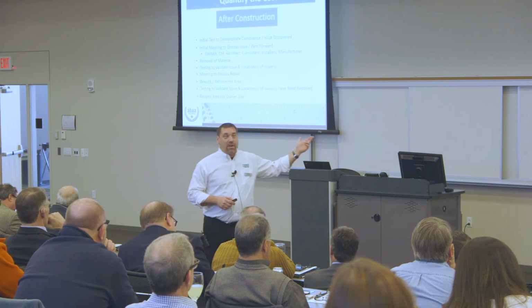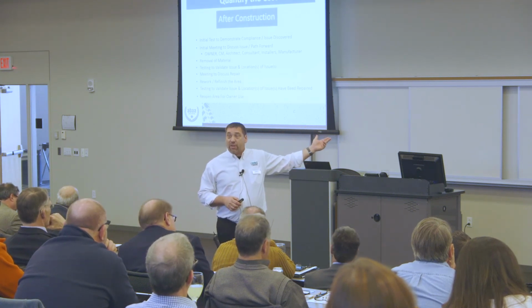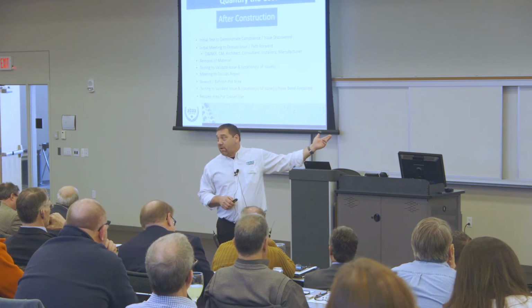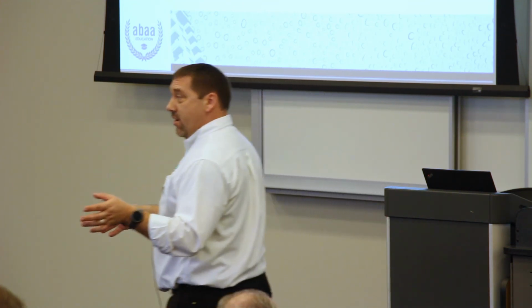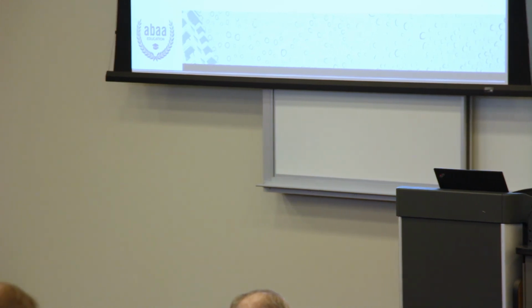Then you have to test to find out where the issue is. You have to have a meeting to discuss the repair, because if there's failures, everybody wants to make sure the repair is proper. Then you're talking rework. You have to test again to make sure that what you did fixed all the leaks. You ever chase more than one leak? I'm just talking about revalidating it. Yeah, I've chased more than one leak.